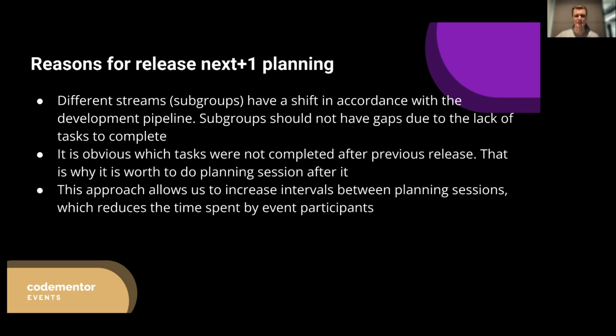So let's say a quality assurance engineer always lives a little bit in the past relative to the development team. And in order to not get an underload for the team and always have a task for them, I strongly recommend planning not only the closest release version, but the next one also, at least one sprint for that.